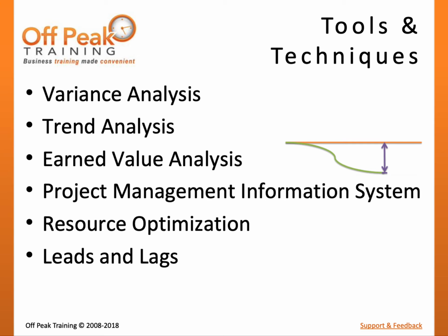Applying leads and lags is the documentation of required space or overlap built into the dependencies of project activities. And schedule compression is a technique to shorten the project schedule duration without changing the scope of the project. This can include crashing or fast tracking.